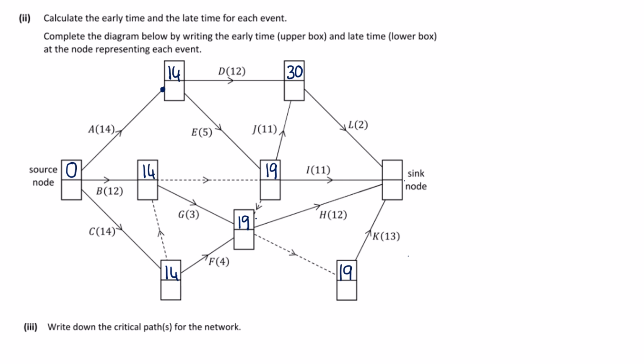And then we're on to our sync node. So we have 1, 2, 3, 4 options. So L will give us 32, I will give us 30, H will give us 31, and K will give us 32. So we're going to go to the biggest, which is through K, and that is 32. And then our sync node has the same time for both early and late, and then we start working backwards.